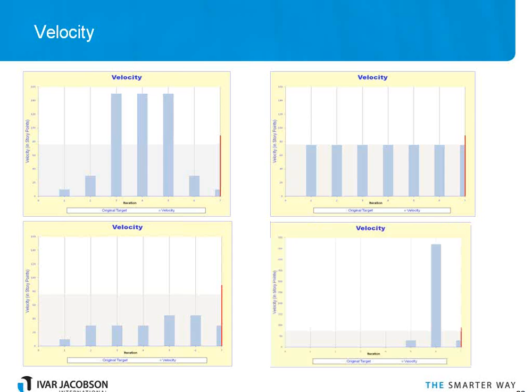So here would be the velocity chart for one of those projects where there's no testing until the end. Don't allow people to claim story points for stories that have not been verified by testing and gone through some initial acceptance. Obviously, if we get defects in things that we've already counted, we'd have to take them off.